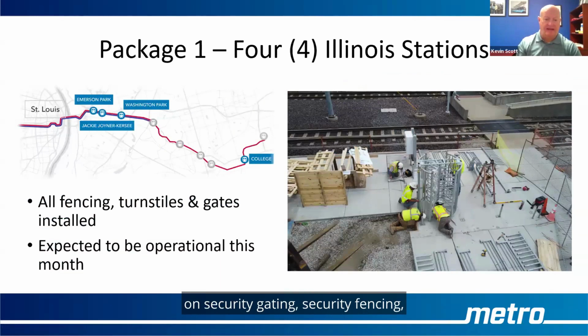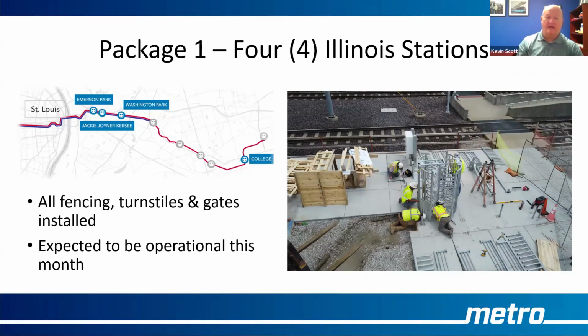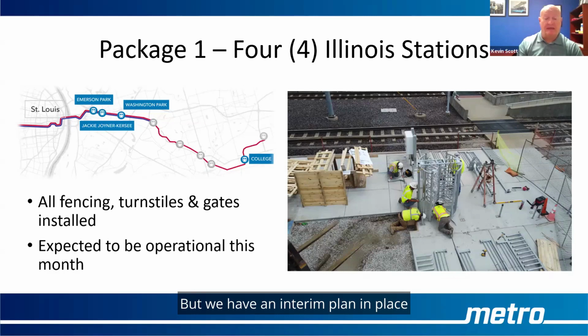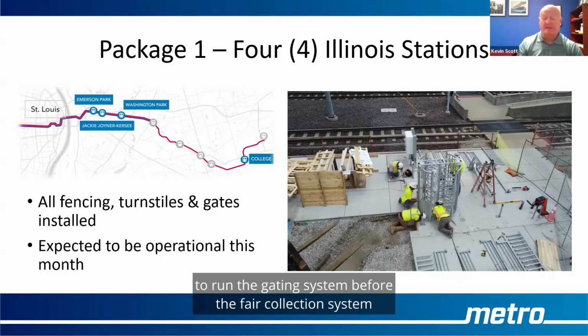focuses again on security gating, security fencing, and obviously the implementation of closed circuit television. But it is a corresponding program or a partnering program to the overall upgrade of our fare collection system. The hardscape changes obviously will progress faster than the project relative to fare collection and putting that hardware in and updating that fare media. But we have an interim plan in place to run the gating system before the old fare collection system is replaced,